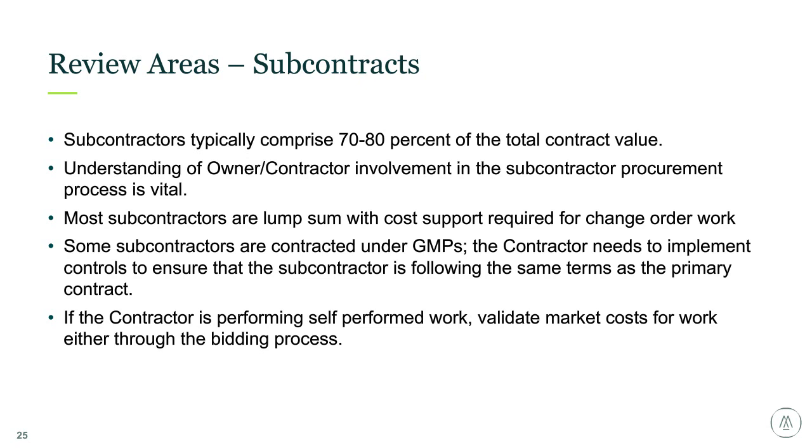That is, if it's a GMP, the contractors are required to get bid documentation and provide minimum reports to the owner, and there's an established approval process. Having good procedures here can prevent excessive subcontracts and promote competitive bidding amongst a qualified pool of interested vendors.